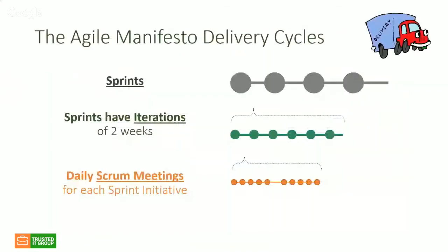Some of the attributes from the Agile framework that we picked up, and we built basically the framework based on these. Sprints. So sprints are basically either 2-week sprints or 4-week sprints or monthly sprints, or sometimes quarterly sprints. You'll be surprised, there are some organizations that are doing sprints quarterly, and they just take this concept of quarterly planning and quarterly sprints. So regardless of how you do the sprint planning, you can have different lengths, different time, baked into each of these sprints. The point is that you have to have the sprints sequentially set up for all the teams.